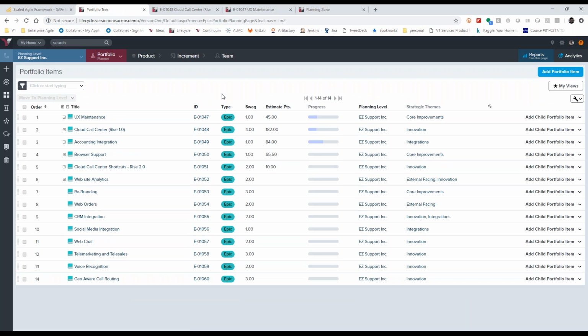As we look at the backlog, it's a great place to look at a prioritized backlog. In context of everything else that we've looked at, understanding priority is top down. So things at the top are the most important. As we move down, they become less important. And in this case, we can see that we're making progress on the top 3 items, and we have at least started elaboration on the top 6. So we're starting to get into the estimations. We may be getting into some scheduling things that we'll take a look at in just a moment. But this is starting to give us a big picture of how the organization is aligning to these activities that we have described here.